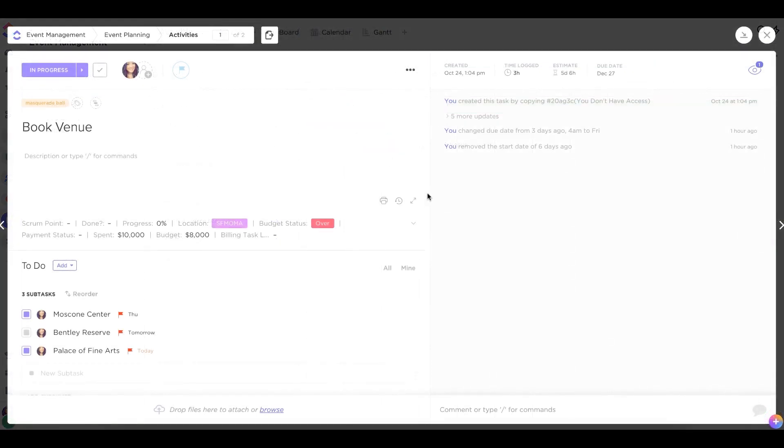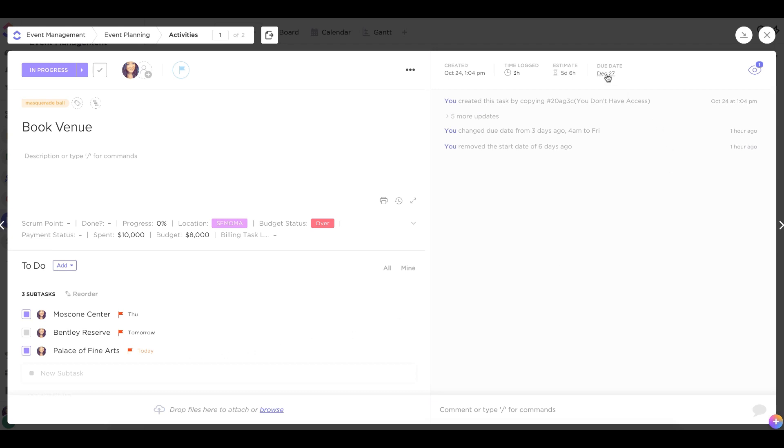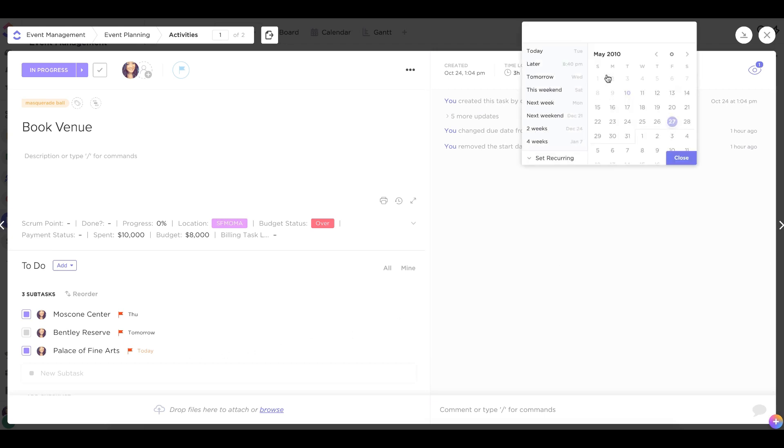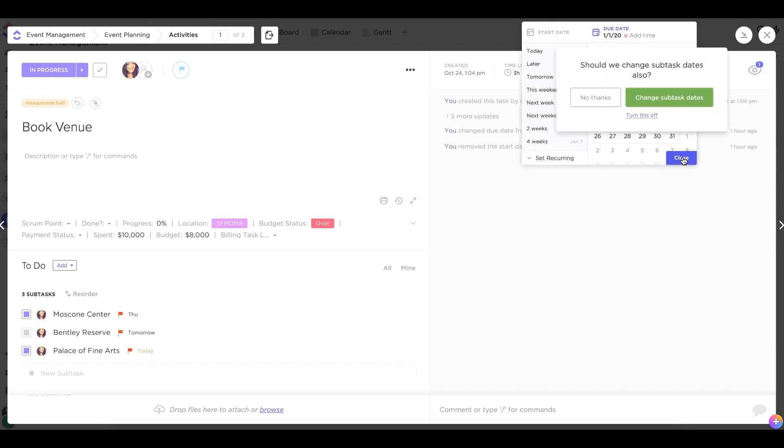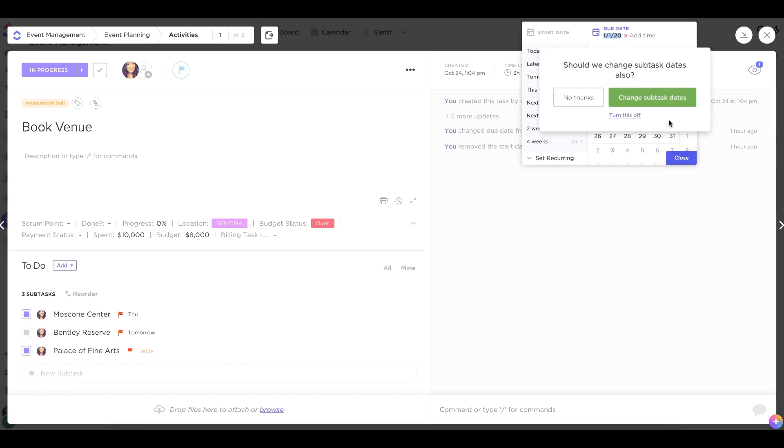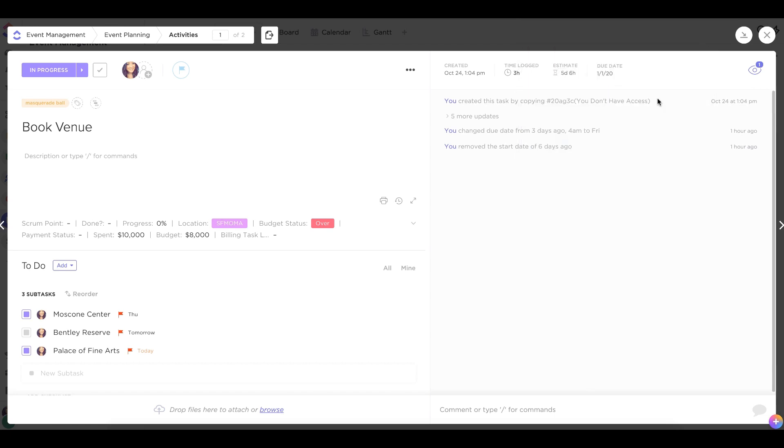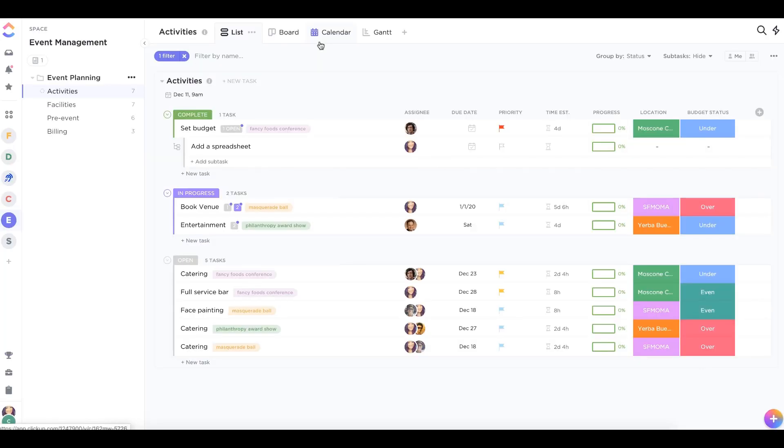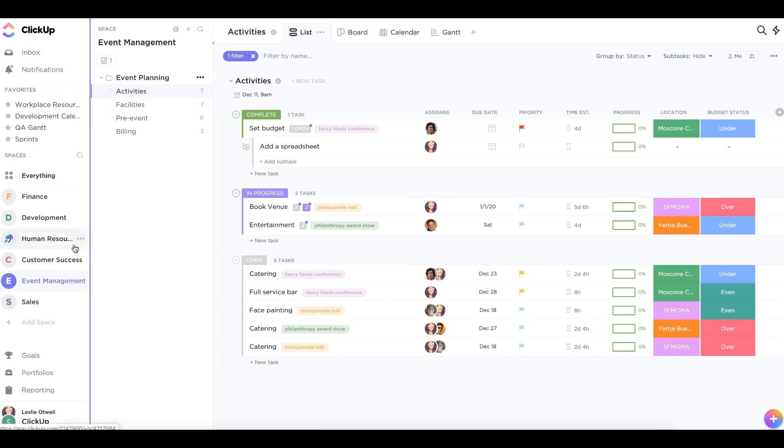Lastly, let's discuss how to remap subtask due dates. This feature allows you to automatically adjust the due dates of your subtasks when you change the date of the parent tasks. Note that the subtask due dates will be adjusted by the same amount that you change the parent tasks. If you want to use this feature, just make sure that you've enabled the Remap subtask due date click app for your spaces. Admins can do this by navigating to a space's settings.